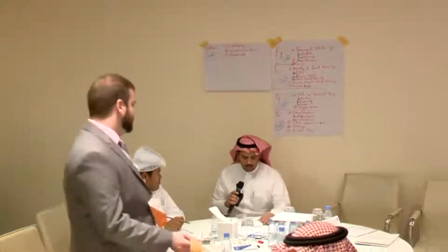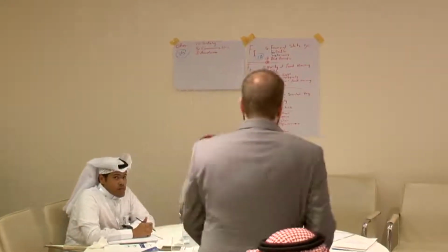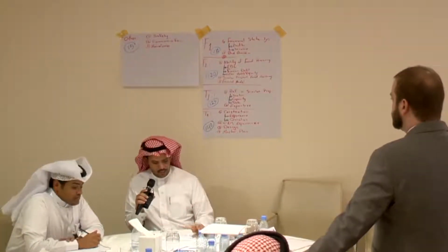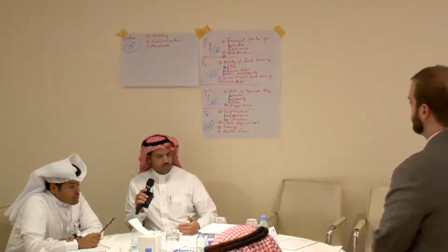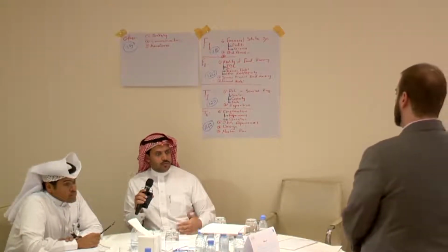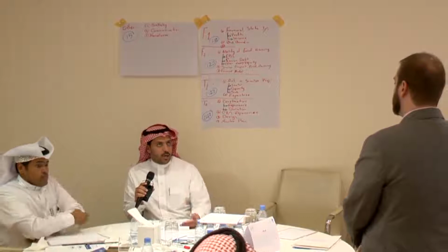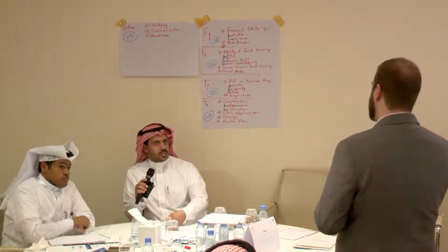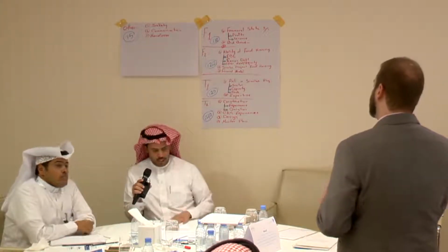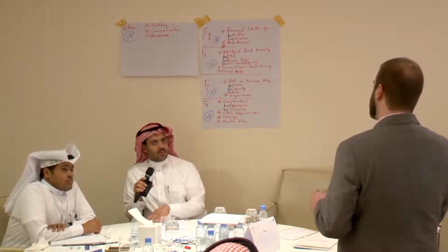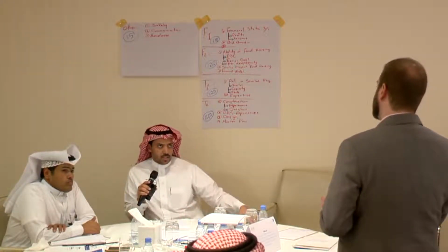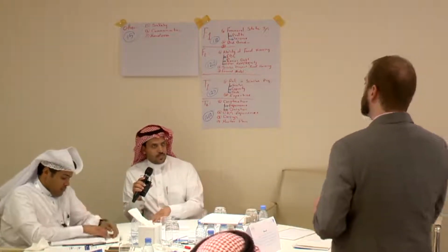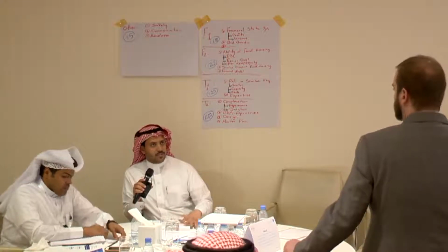I think we wrote here some on our notebook. We think the background, the brief that it's giving, will be covered more than enough. However, the scope: first of all, some of the scope will be under the government control to secure the land of at least 12 meters, the width of the roads. And once it's secured from the government, it will be transferred to the private sector to do the design, build, operating, maintenance, and then transfer. We will have 50% of it toll.